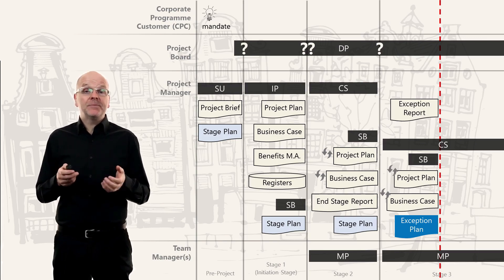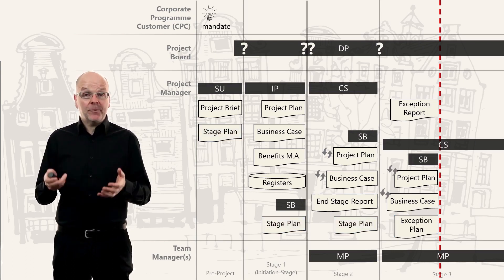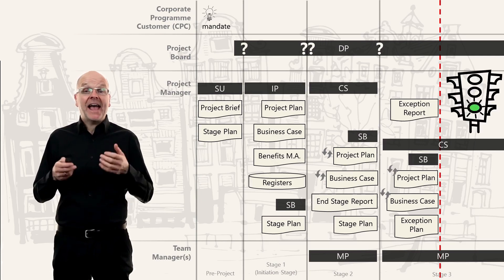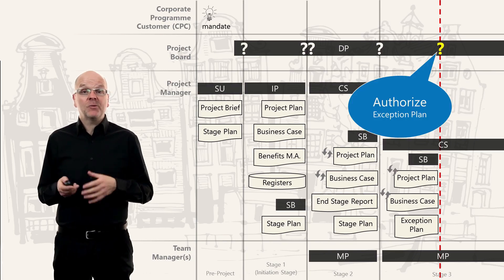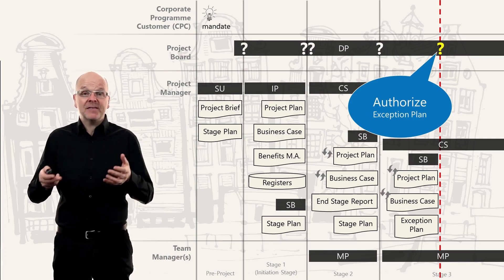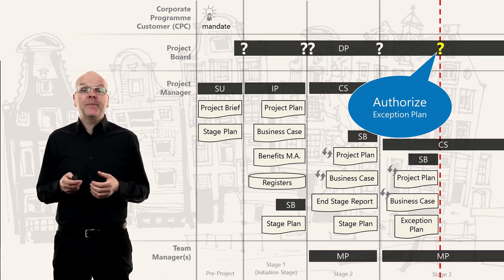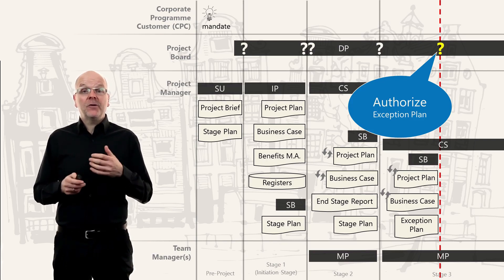Once the exception plan is complete, the project manager asks the project board: can we complete the stage? The project board considers this request and makes a decision called 'Authorize an Exception Plan.' This basically says you can continue with the stage, and the project manager will use the exception plan to complete the current stage.